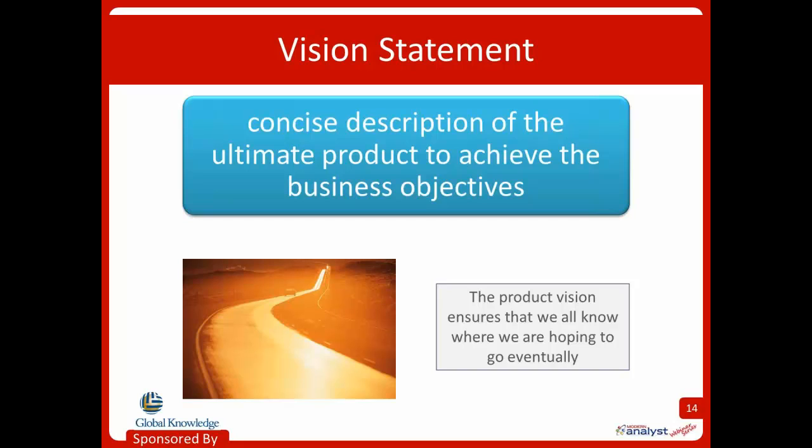You might encourage your key stakeholders to actually draft their own vision statements for a project. This is going to help you very quickly illustrate different understandings about their objectives. And if you're well into your project, it's still not too late. You can actually go back and do it. Pull everybody together in a half-hour meeting and say, here's what a vision statement is. Let's all draft them together. Doing this, you can then fix any lack of focus or lack of direction that you identify in your stakeholders sooner rather than later. So it's kind of a neat activity that you can do midway just to get everybody refocused on what the goal is, what we are trying to do.